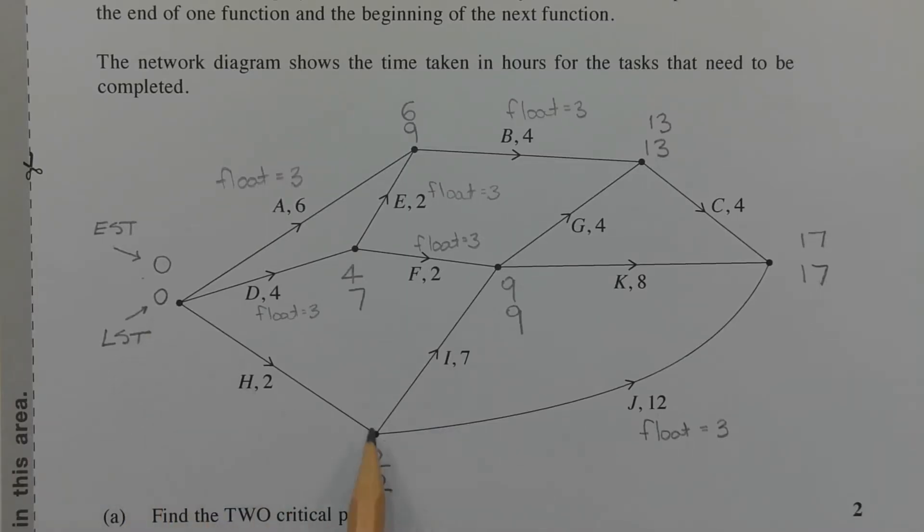Let's look at task H. Starting at zero, adding two hours, we get to two hours here. Two plus seven gives us nine. And that's why there's a nine here. So look at task G. Nine plus four gives us thirteen. Let's look at task C. Thirteen plus four gives us seventeen. Let's look at task J. Two plus twelve gives us fourteen. Seventeen is the higher of the two numbers which is why the seventeen goes here for the EST.